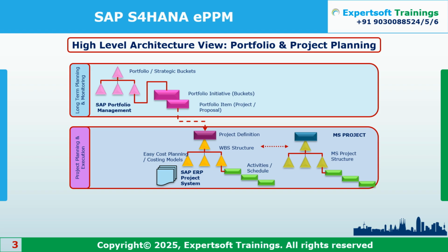I have given 1 million over here, but how can I distribute 1 million to 10 different projects? Whatever planning I do under this item level, based on that the system will automatically allocate the budgets from year to year. That is the yearly budget activity if you do it under this bucket level. Otherwise, you can do your financial planning at item level, and it will update over here. From this, you can fetch the data to SAC.